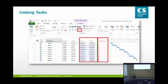Okay, the summary tasks kind of collectively summarize the tasks within them. So the summary task, let's say the duration of all these tasks was probably about April, May, so it's about 30 days there, right? It will tell you the duration of all of those tasks. To insert those, you just click above it and insert the summary task. And if that doesn't work, you just indent the tasks beneath the summary task, and it'll actually make it a summary task. Yeah, I'm thinking of 2 summary tasks.